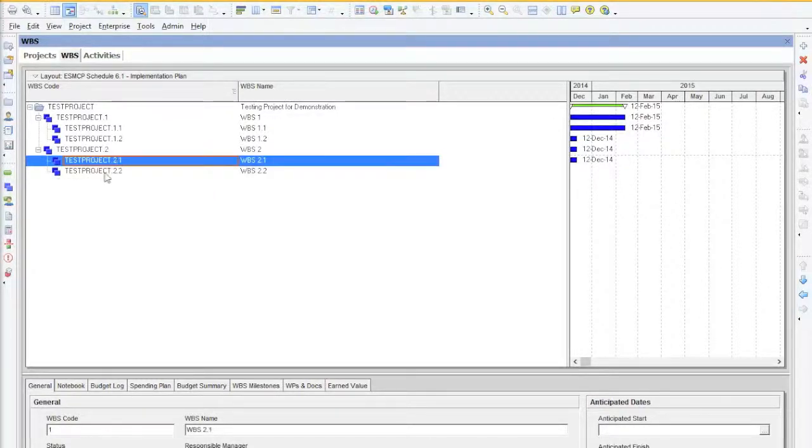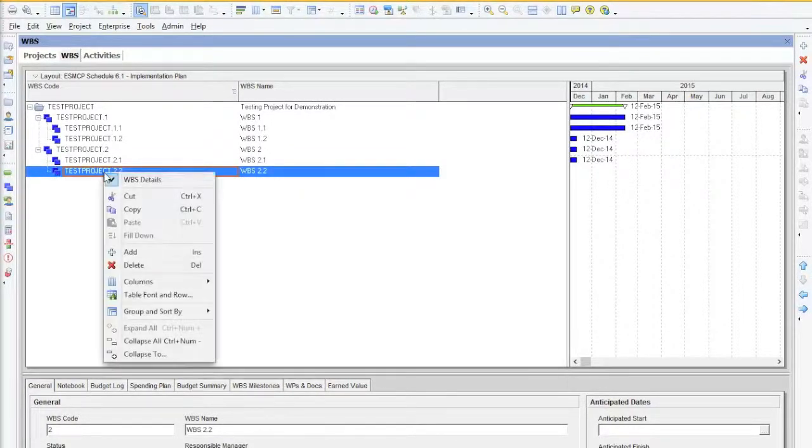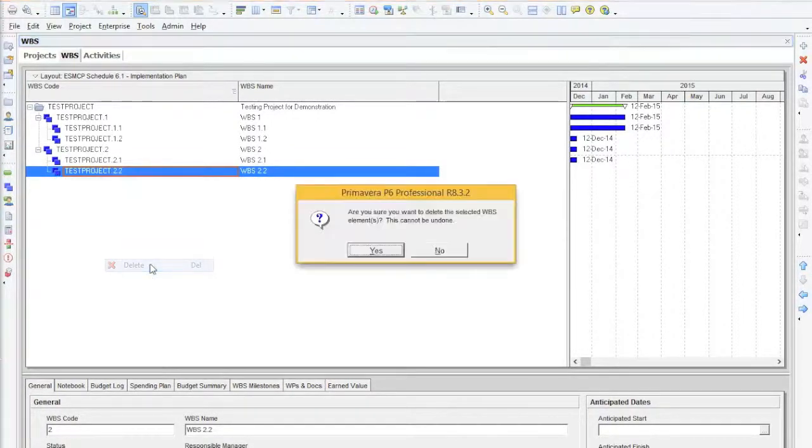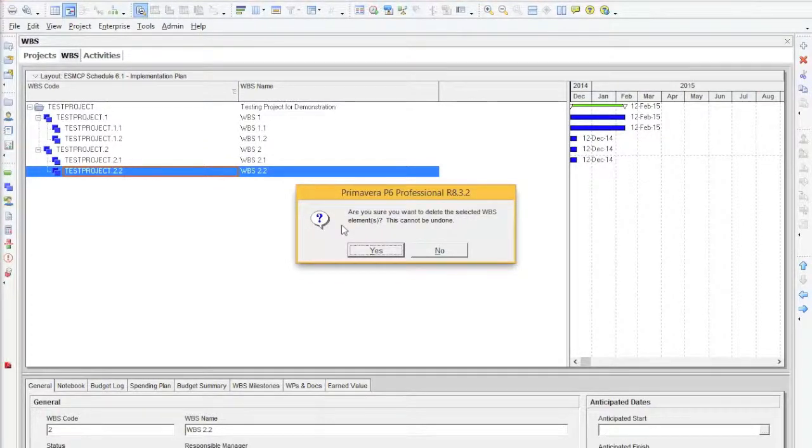Quite simply, to delete a WBS node, we right click and select Delete. Primavera will then ask you if you are sure you want to delete that selected WBS as it can't be undone once deleted.